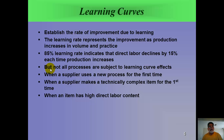The next item is learning curves. We know that as we do something over and over, we get better at it. What we're looking at is finding out what the rate of improvement is as we learn. The learning rate represents the improvement that happens as production increases in volume — the more we do, and through practice.